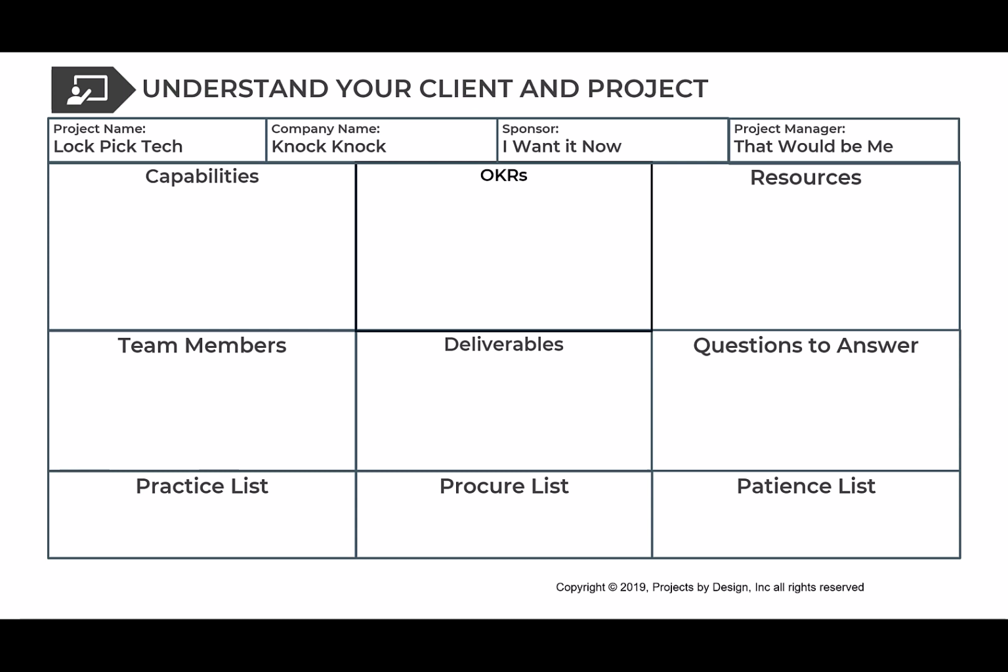So Silas manages 5 servers, and it takes him 10 hours a week. Boom, you plug that in, and it shows on the other side whether he's working on project or non-project work, and when he's available to take on more. And that gets stacked up against your projects, where you're not putting in named resources but roles, right? I need a C++ developer. I need a server person. I need a network person.